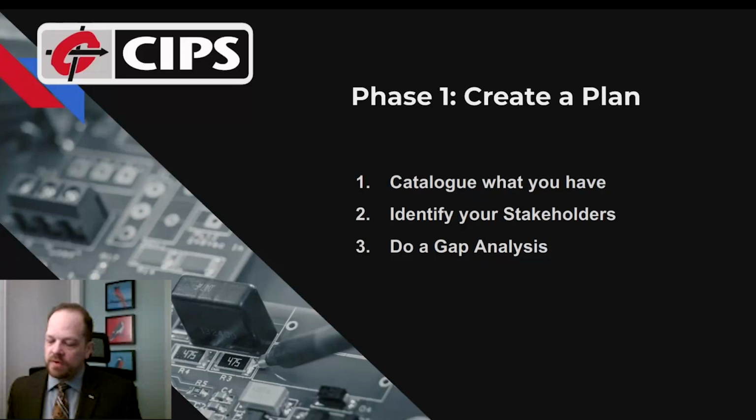Usually, the first task that I do with my stakeholders is I'll bring in a business analyst or a BA, and I will create business use cases. So these are just very simple stories going through every single element within their systems as a role, when some trigger, then outcome expected. And I'll make thousands of these business use cases, and I'll have the business prioritize them. What is the number one priority? What's second, third, fourth?